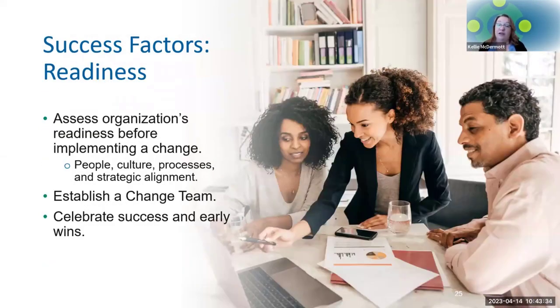You must assess your organization's readiness before implementing a change. Now, it says organization's readiness here, but I think it's also important to assess your readiness for change, as well as your team's readiness for change, because that's going to be important also. Just like in project management, where I recommend that you do a personality assessment with your team members, because it's important to know everyone's communication styles and how everyone interacts with each other. It's also important to do a change readiness assessment with them and yourself, to see how ready you are for that, or to see if there are some weak areas that you might be able to work on to help create a more successful project here. This means that you're going to be looking at people, culture, processes, and strategic alignment.